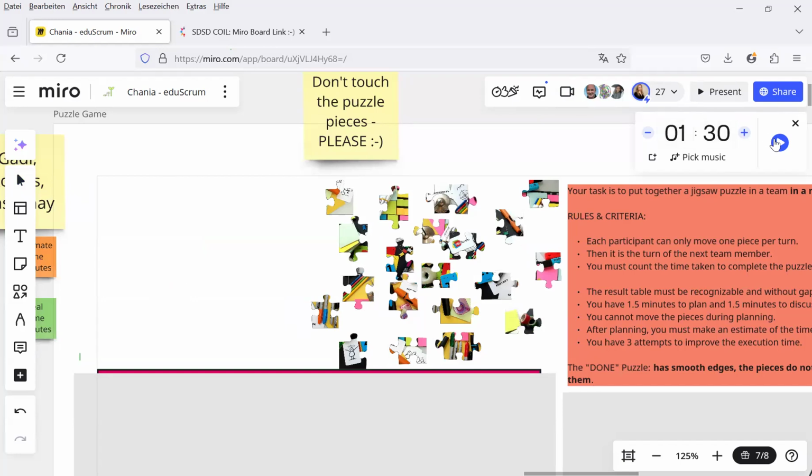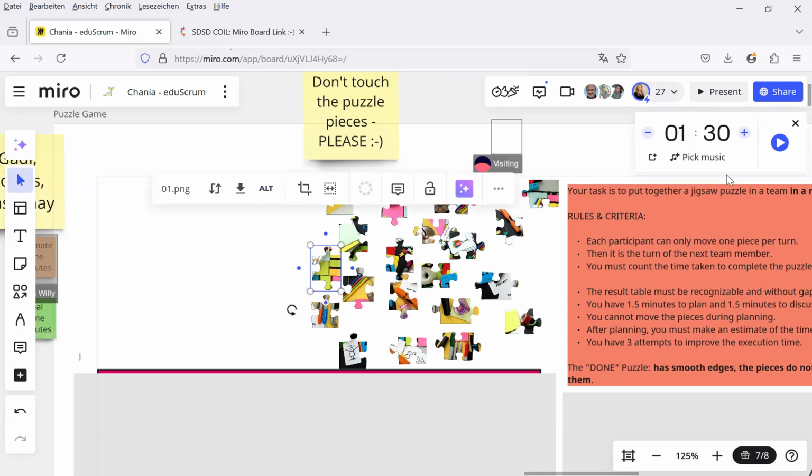So how much time do you estimate? Still 1.5 minutes. Give it a try so you gather experience for the next round. Actually, when I think of it, 1.5 minutes might be a good estimation for one person. But as we are working in a team and need to collaborate, pretty sure that for the first sprint it will even triple. So more minutes, like 6 minutes.